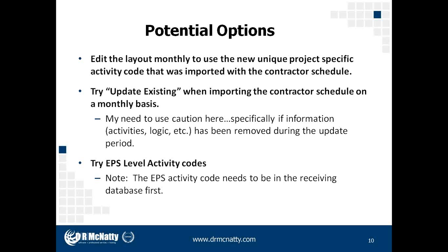The reason being is if I'm an owner organization, especially if I'm going to be importing contractor schedules, we all want to limit the amount of global data that's going to come in so that we don't create any type of pollution, if you will, within the overall database. So we try to limit everything to be as project specific as possible. This would include calendars, codes, and even expenses when it comes to tracking costs.